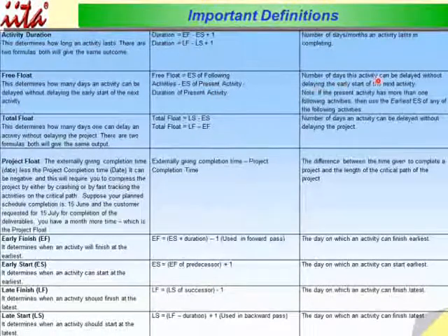Note, if the present activity has more than 1 following activities, then use the earliest of the early start of any of the following activities.